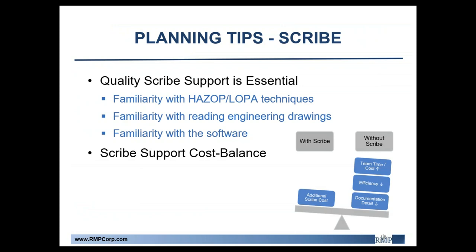There's also a lot of value to including scribes. While the facilitator can be tasked with both facilitation and scribing duties for a relatively small manageable group, the pivotal decision-making parameter is whether the additional cost of a scribe outweighs the money saved by shortening the HAZOP session and subsequent documentation time. In most cases, the financial threshold for when it's more convenient to use a scribe is once the team — excluding facilitator and scribe — exceeds about four individuals for a local project, or about five individuals if travel is involved. You really need to use a high-quality engineering scribe with familiarity with HAZOP and LOPA techniques, familiarity reading engineering drawings, and familiarity with the software.